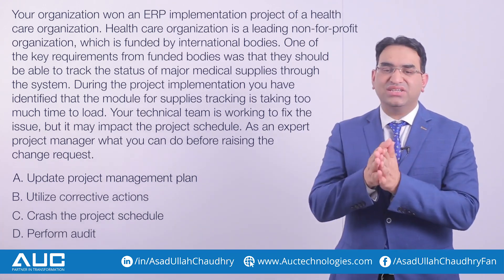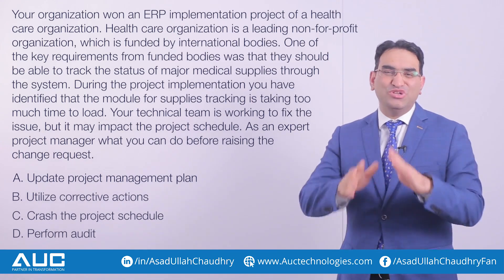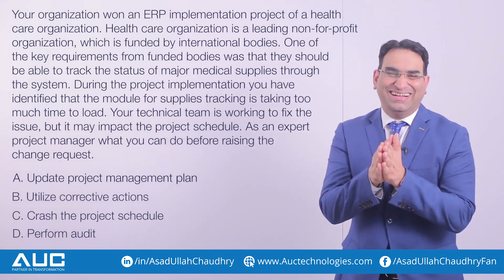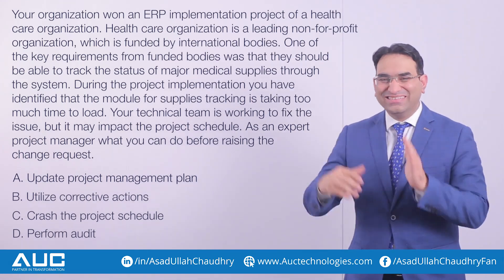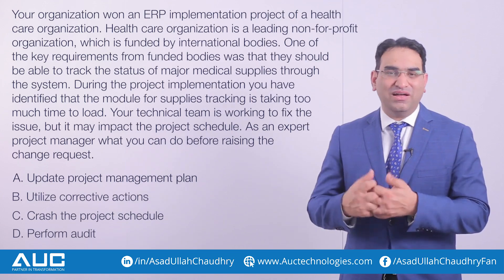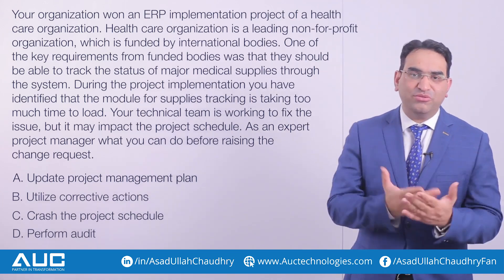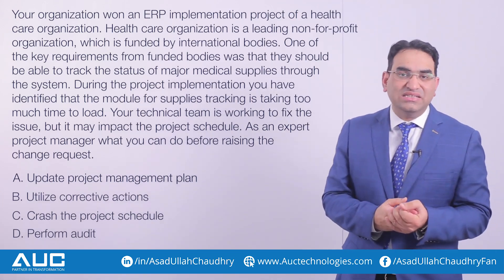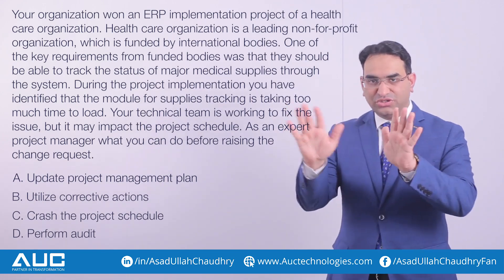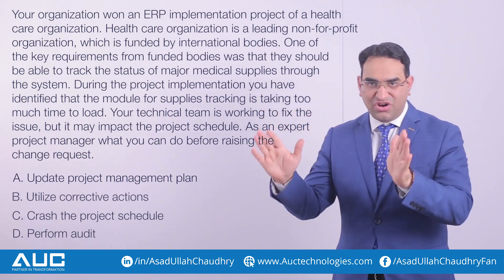Option A says update the project management plan. Please don't choose this, because there is no need to update the project management plan. There are no change requests, there is no impact on project baselines, and there are no approvals. So option A is outright wrong.